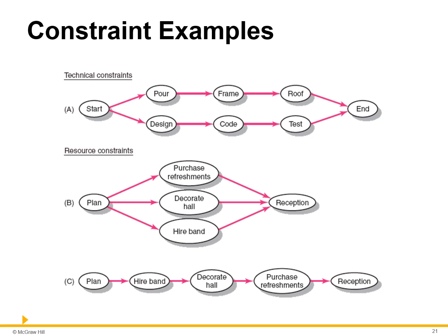There is no technical reason or dependency of one on another, such as B in the figure. However, if one person must perform all activities, the resource constraint requires the activities be performed in sequence or series. Clearly, the consequence is a delay of these activities and a very different set of network relationships. This is shown in Figure C.